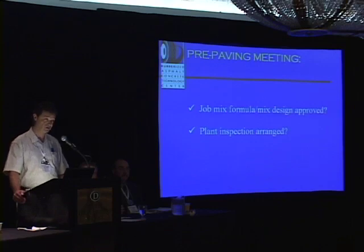It can be a significant amount of time between when you have your pre-construction meeting, typically in an office, and when the paving can actually take place on the job. And one thing I promote is a pre-paving meeting between the inspector, the materials testers, and the contractor, 2 or 3 days before the project is scheduled to start. One thing the inspector should have out there, and the materials producers, is an approved copy of the approved job mix formula or the approved mix design, and plan inspection.